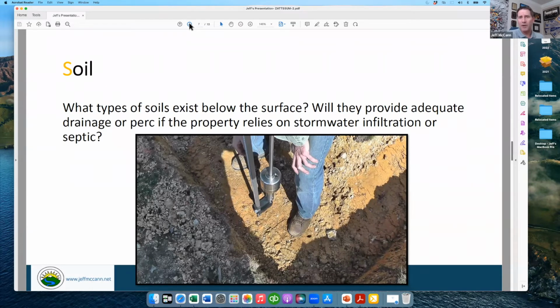that leaked and came onto your property, and you have to remove that soil. So, and then with stormwater on the property, you'll hear impervious surface, anything that gets covered by roof or pavement. Water may have used to be able to go through the soil into the ground, into the aquifer, but now because you have a hard surface there, it can't. And we have to figure out how to handle that stormwater. Maybe it's going to go into a rain garden to go back in, or into the public storm system.